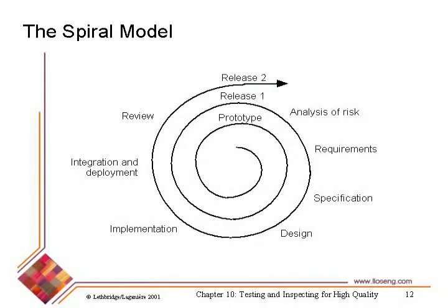Develop requirements for this first prototype. Specify it. Do some design. Implement it. Deploy it to a bunch of people who are going to be playing around with it maybe. Review the results.